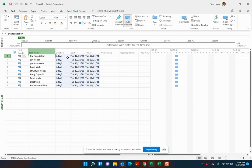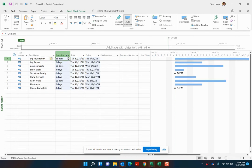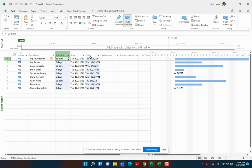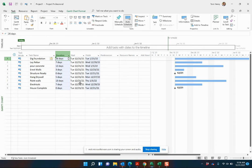If I come in here and paste those durations down. Boom. You can see it's now calculating the start and finish dates for us based on the durations, but they're all starting at the same time. It's because we're not putting in a start date. It's actually taking the project start date, which by default is going to be today's date. 12, 21, 21.